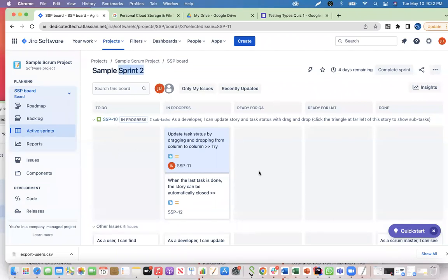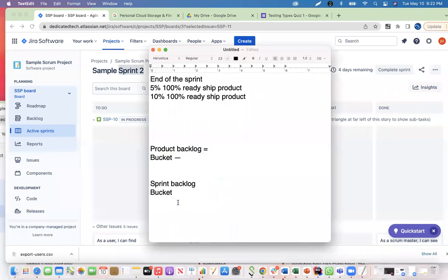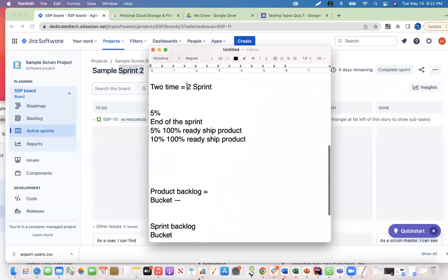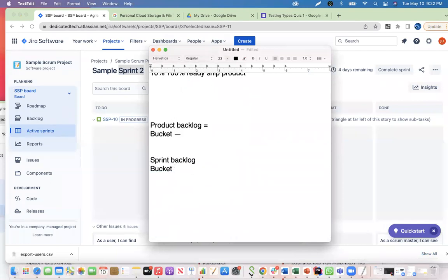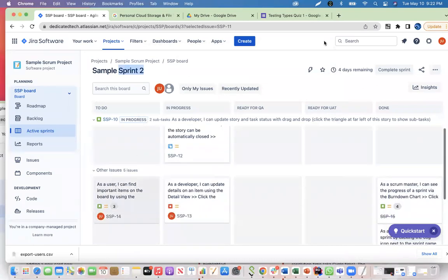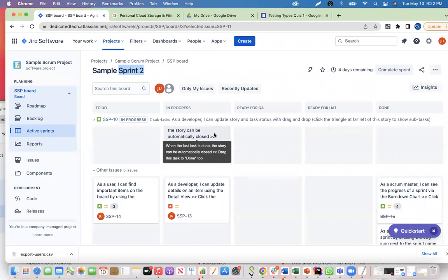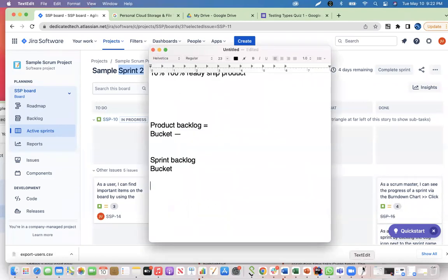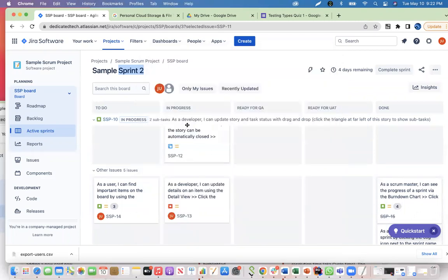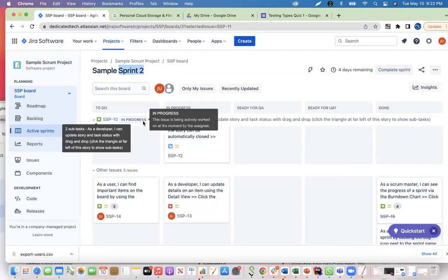To do. Now before you even complete, we know that one sprint is equal to 2 weeks, right? So by the end of the 2 weeks, all the items that are in to do should be in done. And we're ready to start sprint number 3. And we can probably do that here as soon as we're ready. But does it make sense? Does it connect any dots? And along the way, because you have 2 weeks, every day you have a stand-up meeting, which we just performed, right?